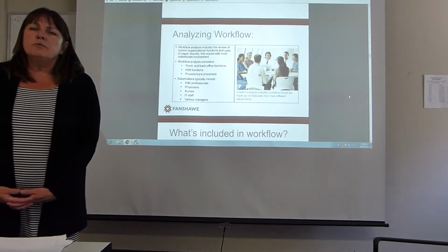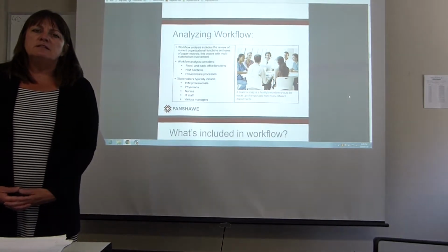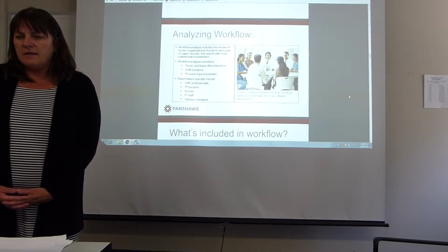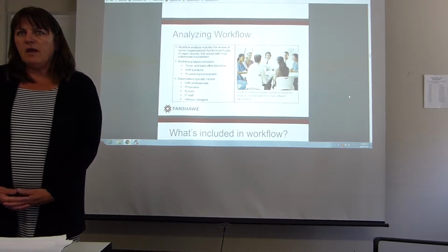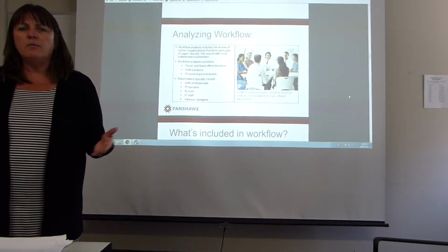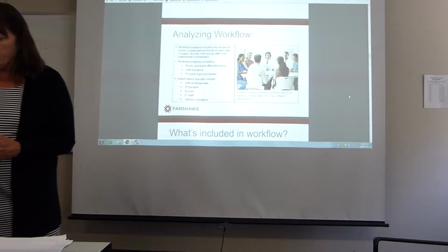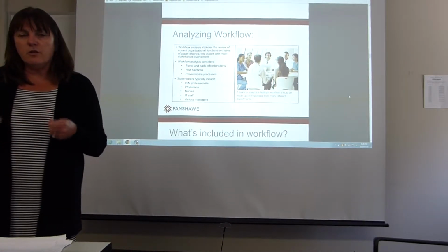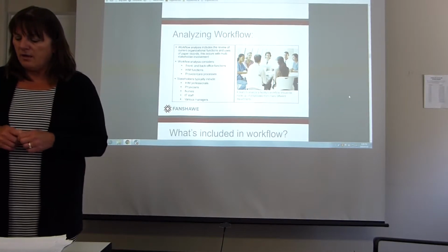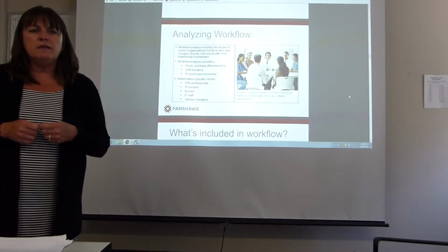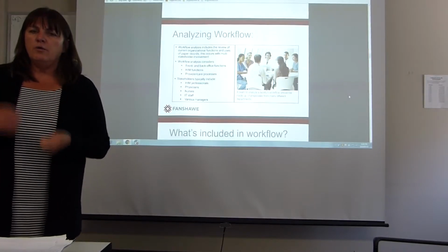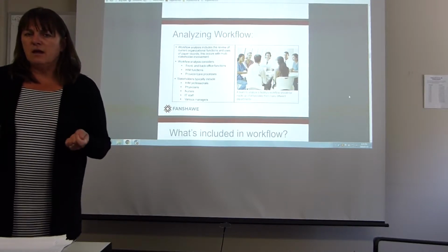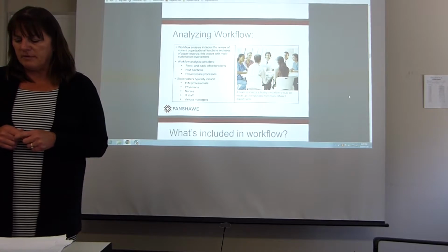One of the crucial steps, in my estimation, is analyzing the workflow of the current state and taking a look at what goes on now and how we can improve it. So the workflow analysis is the review of the current organizational functions and the current use of paper. So who initiates the paper? Who writes on the paper? Where does the paper go? Who else interacts with that piece of paper?